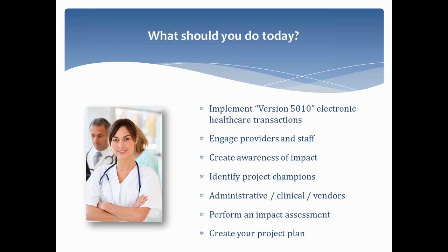And then also identify who your vendor contacts are, because they will also be part of your team as well within the different vendors that you work with, that you'll need to understand their plans and coordinate testing with them and make sure that everything's ultimately ready for go live. And then you want to start doing an impact assessment and then ultimately create your project plan. And your impact assessment is kind of going back to what ICD-10 touches and identifying all of those areas and documenting that, getting it written down. And from that impact assessment, then you can start actually creating a formal project plan.